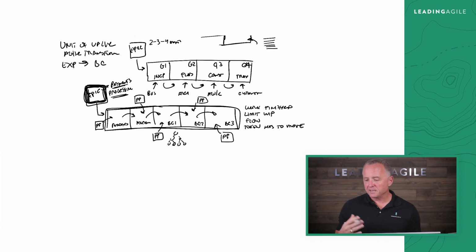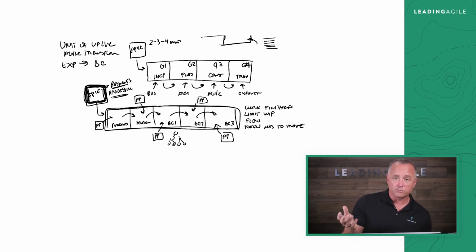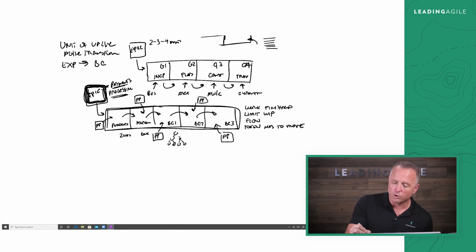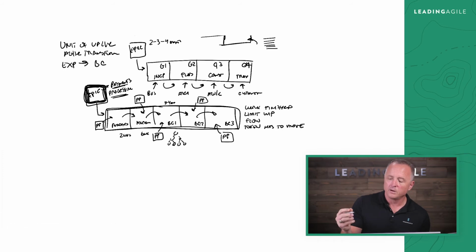Okay. And I think it's probably more complicated than that, but that's really about as simple as it gets. So we know that maybe the readiness step is anticipated to be about 2 weeks, assessments about 6 weeks. We know that we probably don't want the journey to Basecamp 1 to be much more than about 3 to 4 months. The journey to Basecamp 2 probably needs to be about 3 to 4 months. The journey to Basecamp 3 probably about 3 to 4 months to get them into these ready states.